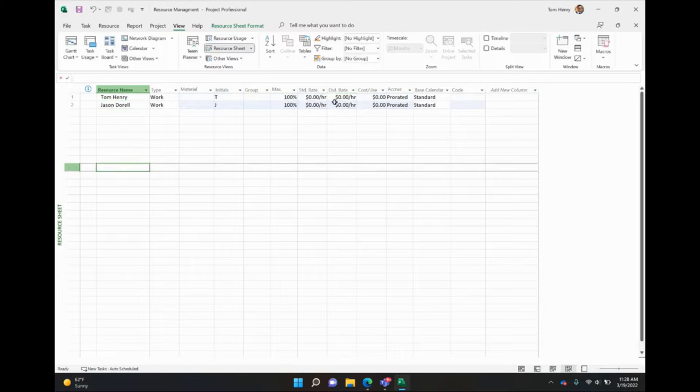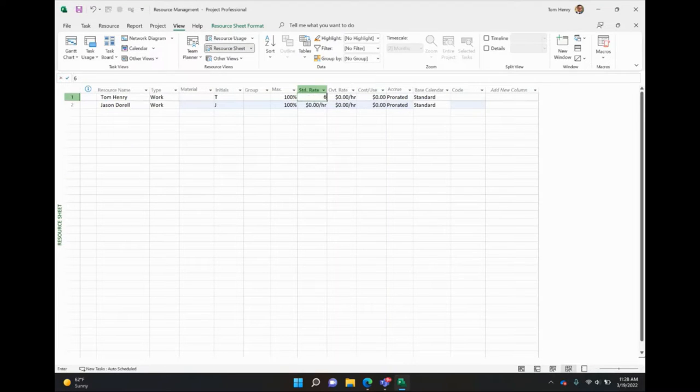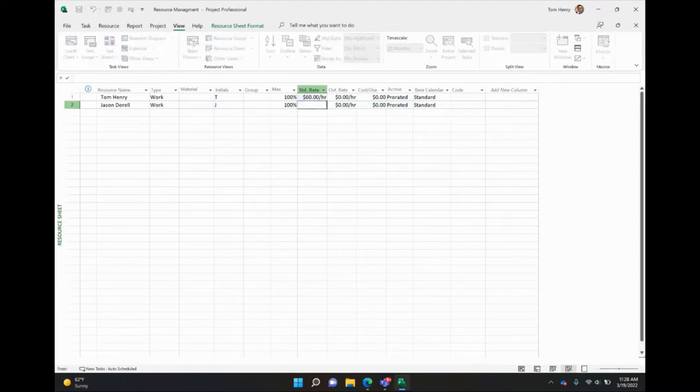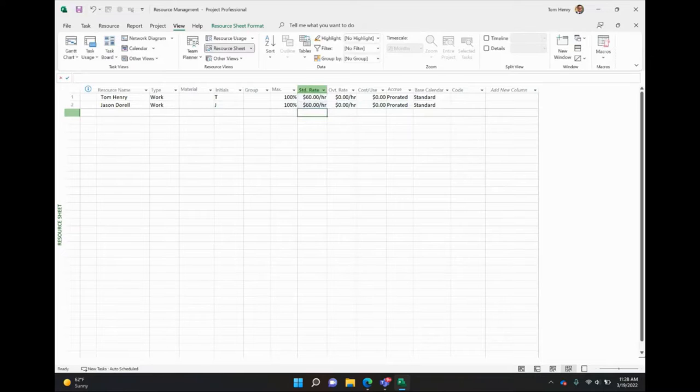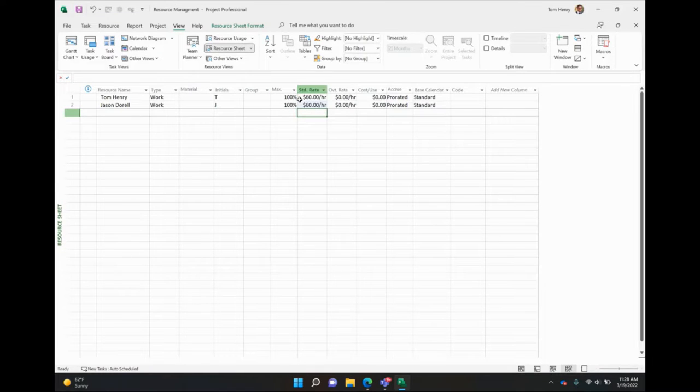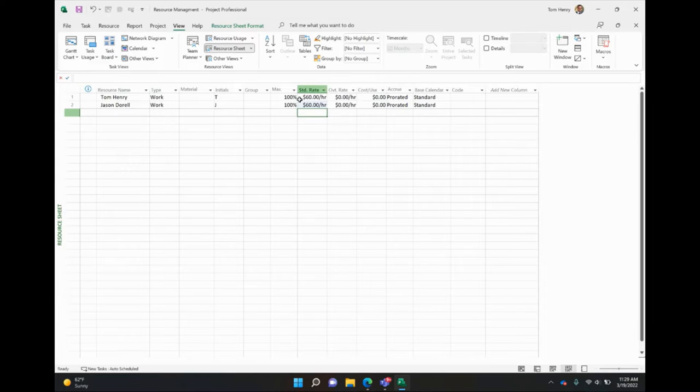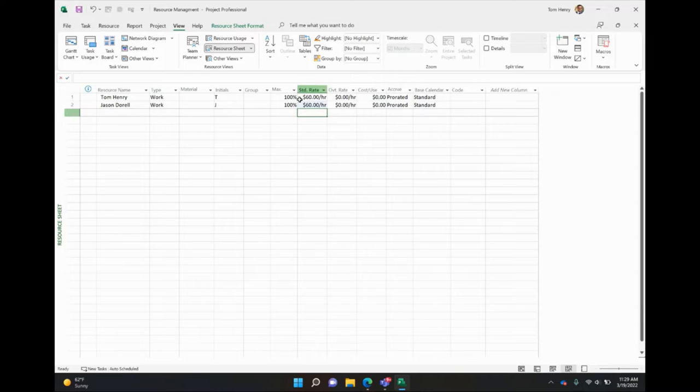And we're going to give them a standard rate of $60 per hour. Now people is the first thing and it's going to be your predominant resource on a project. So the people that you have assigned to work on the task within your project, that's where your costs are going to come from within the project. For the most part, it's always manpower in projects.